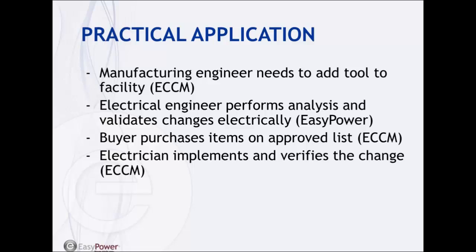So the next phase of that would be that an electrical engineer has to perform an analysis on this new tool in terms of its load, and determine and validate any changes that this will affect within the facility, ensuring things like arc flash, short circuit coordination, and so forth are still within the standards. Finally, a buyer has to go through this list of tools and purchase this item. In this case, the final step will be an electrician will see that this purchase has been made, and then install the tool and verify that it's functioning.